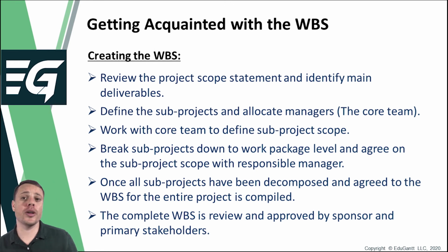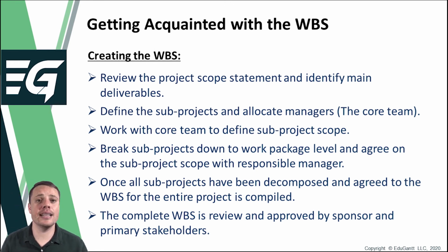So now that we have discussed what the WBS is, let's take a quick look at the logical process flow followed when creating the work breakdown structure. When project management reaches the point where the WBS needs to be created, the initiating processes as well as the plan scope management, collect requirements and define scope processes have already been completed. In other words, the stakeholders have been identified and sufficiently engaged in order to compile and improve the project requirements document and the project scope document.